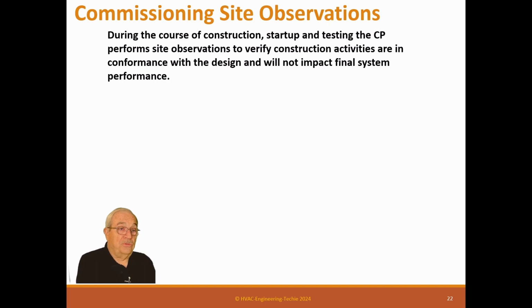And that's true, but boy, I don't like that. Having been a contractor, I want to catch things early. If I'm installing 100 identical systems and I make a big mistake on the first one, I'd like to know it so I don't duplicate that mistake 100 times. So I think it is not a wise choice to not do inspections. I think it's foolish. I think you need to do those.